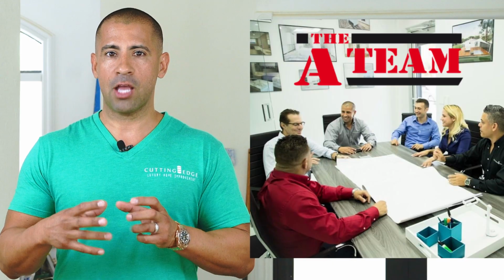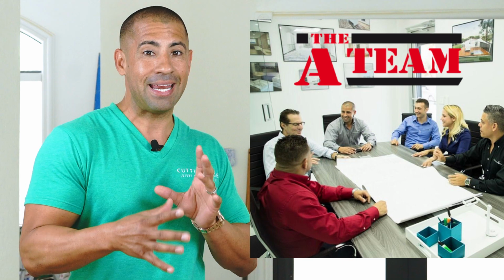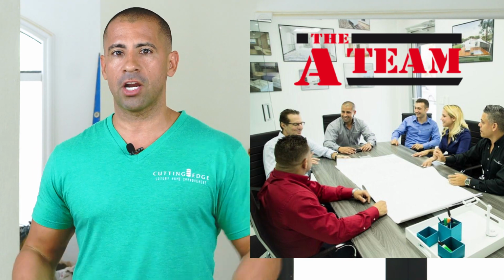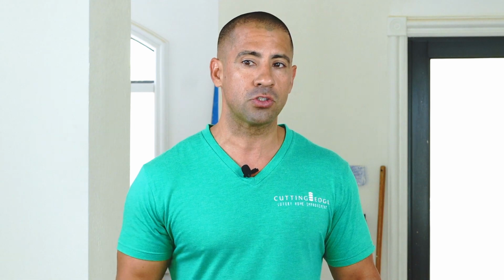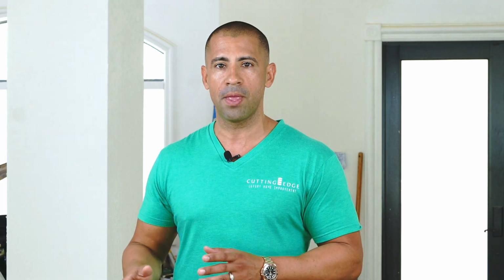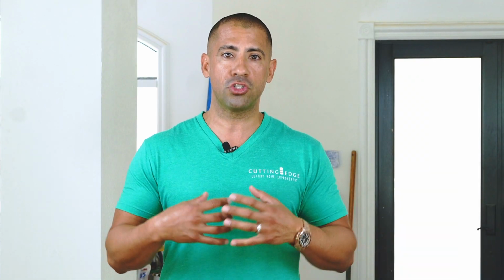The way this gets done is, once I understand the budget of the client and what they want, I get with my design team to figure out a layout and materials that are within the specific budget. Once I do that, I give the client at least one or two options to choose from, and then we move to the next phase. It is your job as a professional to educate them and provide them options on what they could do with their budget, and then get the project moving forward.